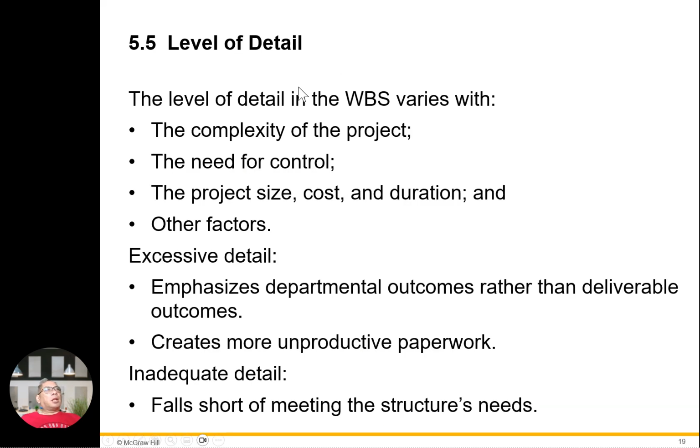Level of detail in the WBS varies with the complexity of the project, need for control, project size, cost and duration, and other factors. Excessive detail emphasizes the departmental outcome rather than the deliverable outcome and creates more unproductive paperwork. Inadequate detail falls short of meeting the project's needs.